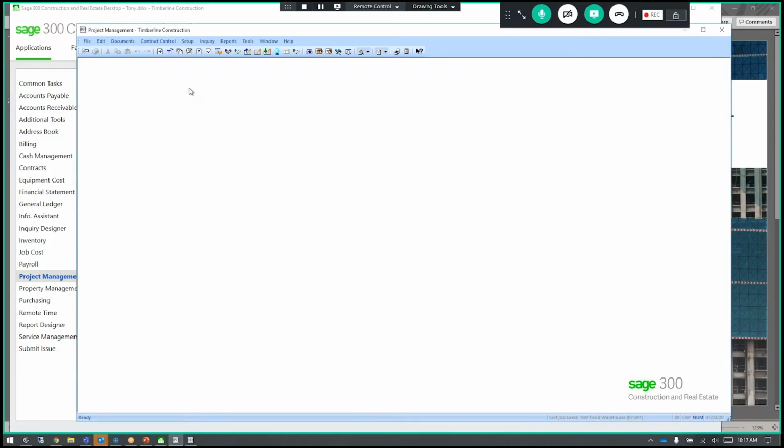So, like I said, we have dollars, days, and documents. The last thing I really want to point out is how we handle some of the dollars differently than job cost does. In job cost, your commitments, or your subcontracts and purchase orders, also have change orders. And then in job cost, you just have change orders with a status. Is it pending? Is it submitted?